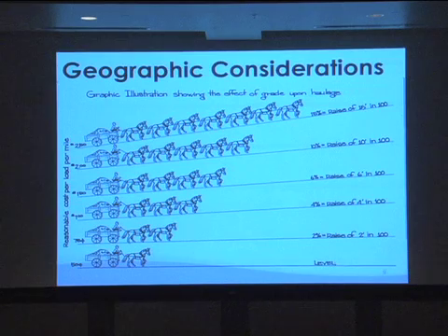Instead, I want to sit there down below the line, put a line that says additional cost for haul, probably, and put a number on it. Put it out front so everybody can see that's what your prediction is. If you go and sit there and put it in your unit bid prices, nobody knows it's there but you.